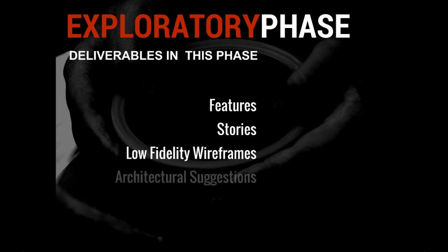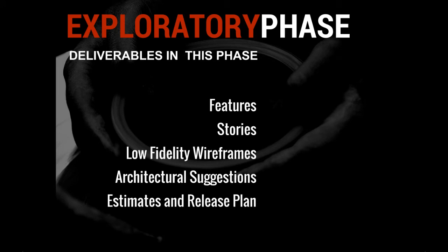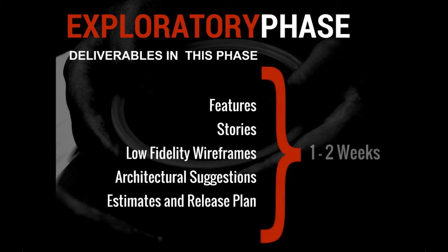While all of the above are being done, the architect starts getting involved in the project as well. This helps us to set an appropriate technological direction for the whole project and in turn ensures that we provide a more confident estimate for the project. At the point we share our estimates with you, we would normally start a dialogue in terms of what parts of the plan sound good and what needs to be changed. All of the above activities take about 2 weeks to complete.